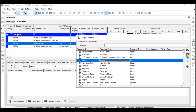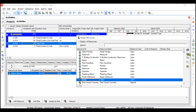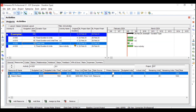Moving on to the third type — Fixed Units. I add a resource and it has taken 40 units. If I add one more resource, you might wonder whether it will do 5 per day for two resources or change the duration since duration is not fixed here. The algorithm of Primavera changes the duration first — it will not touch units per time. I add one more helper and you see it has not changed units per time — units per time is still the same — but duration has reduced to 2 days. Within 2 days they achieve 40 units because each day they do 10 plus 10 = 20, so in 2 days they do 40.